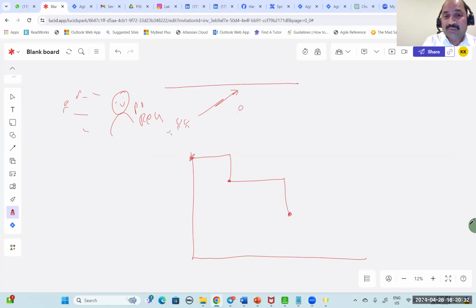The team has estimated 8 points, and the team took this work because it is really urgent. So as and when the team takes it up, what will happen? The amount of work that needs to be completed is increased. So you're going to see a spike up. Plus 8 points got added. So more work got added into the sprint. Whenever the team or product owner is adding more work, you're going to see a spike up. And then the team is going to complete like this.